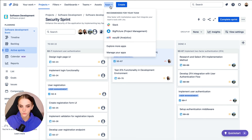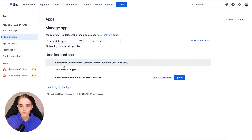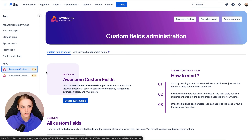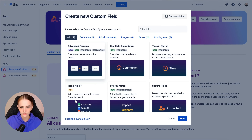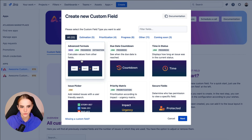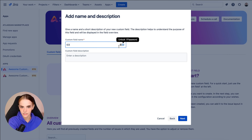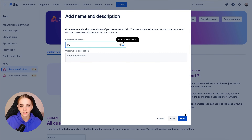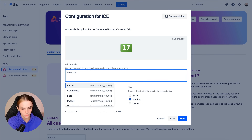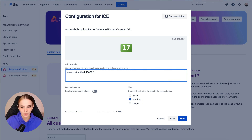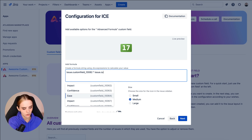Now, to calculate the estimation with ICE, go to the Awesome Custom Fields administration. Click Create Custom Field, and choose Advanced Formula in the Custom Field overview. Give it the name ICE, and here we use Jira Expressions and AutoComplete to select our number custom fields and multiply them using the star operator.